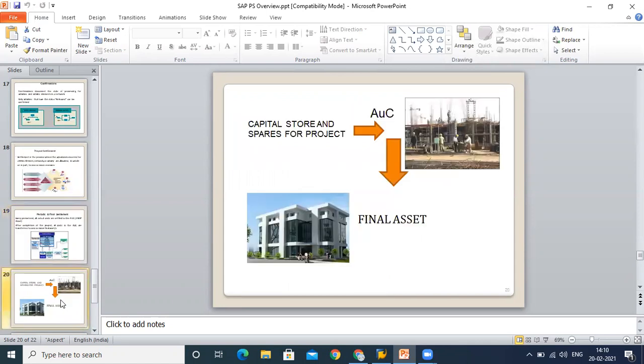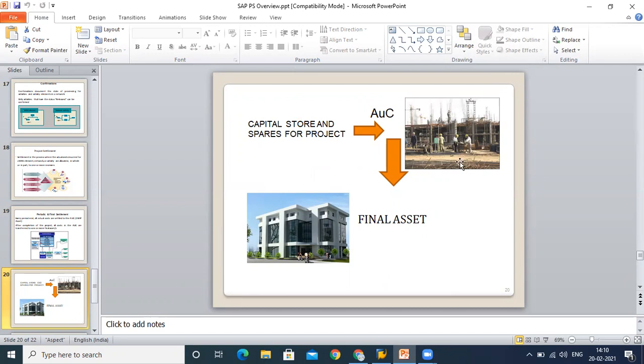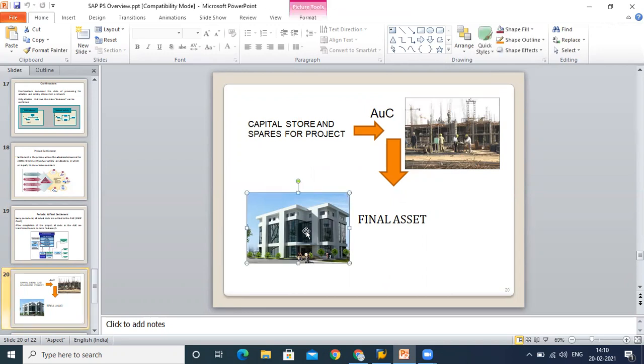This is what I told you initially: when you have settled your project periodically, you will have this type of asset. It is yet not completed because you are settling it periodically, but every month you are settling it. Once this is over and you make a final settlement, then you will have a final asset in place. This is the objective for settlement.